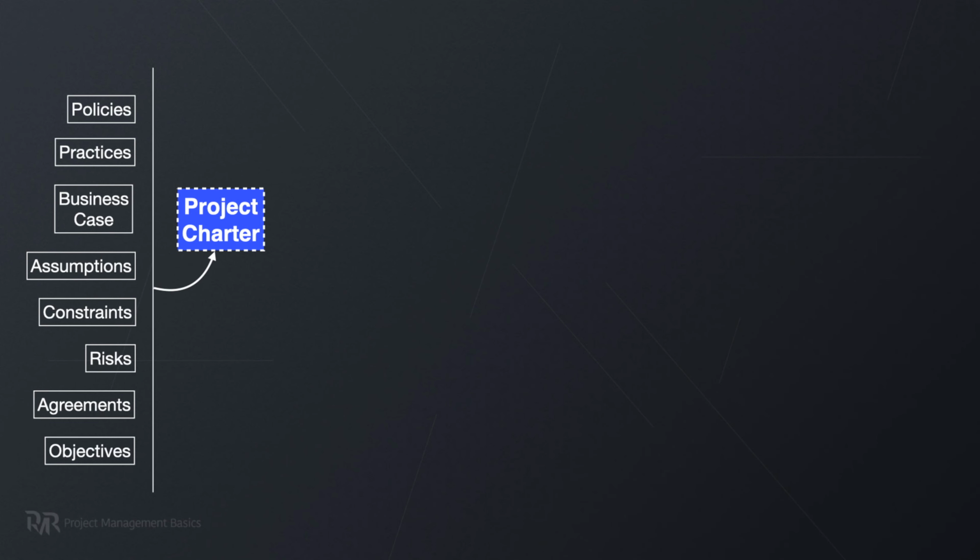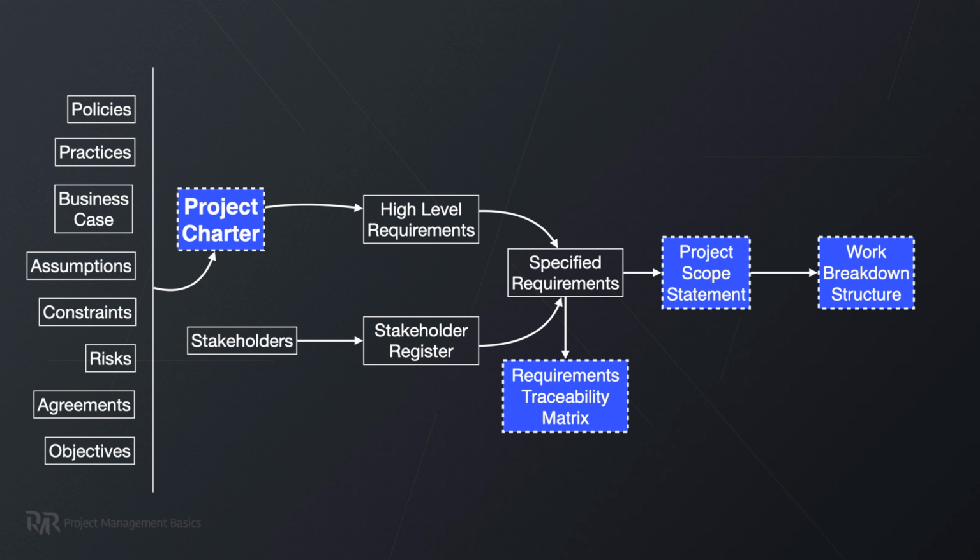On the second level, we have two tools that work hand in hand to help you keep scope creep at bay. So we have an understanding of what our deliverables are. Now we need requirements describing all the features, capabilities and look and feel of those deliverables. In the real world, we have been collecting requirements all the time until this moment. You do it in parallel with all other project management activities. Nevertheless, you want to connect all the requirements together with the business objectives from the project charter.